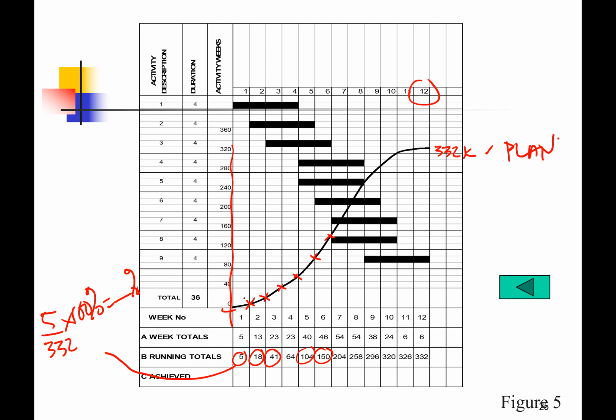When the time comes, let's say on the 1st February, the project will start, and then you will start to monitor the work progress. When certain work has been done or is delayed or not yet performed in reality, you calculate the cost that you really spend, not what you have budgeted.